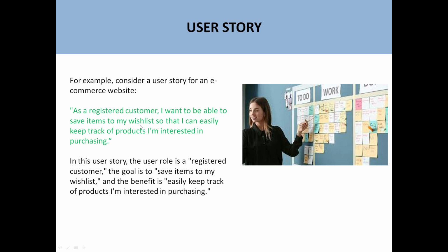And the benefit is that I can easily keep track of products. So user role, goal, and benefit must exist in every user story.